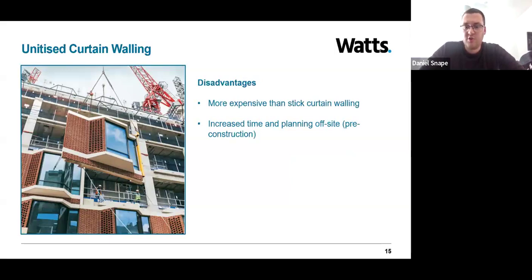This is during the pre-construction period where you need to plan, you need to design, and the panels need to be manufactured. But of course, clever programming can allow for some overlap between design and construction. Another disadvantage is it does require greater upfront investment. Contractors may require advanced payments with this type of wall system. So typically a project that involves this system would follow a less standard or slightly more complex payment process.